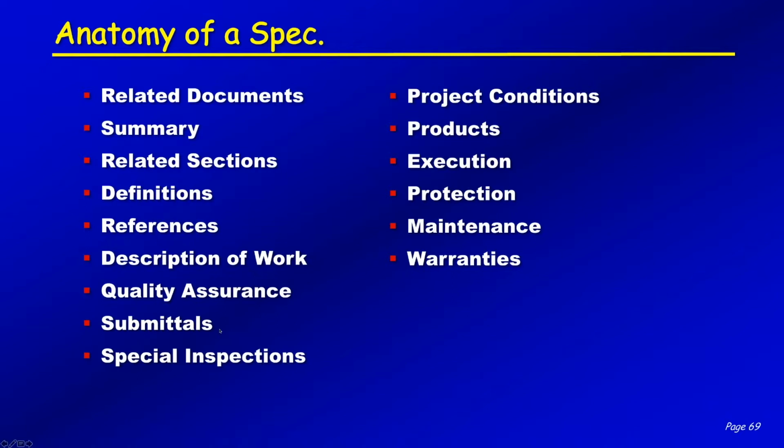I call this the anatomy of the specifications. Almost all specifications are broken down into these basic categories, which is related documents. I do a lot of teaching of subcontractors, so someone will tell me, well, I don't need to worry about bidding the concrete construction part. No, you don't. You need to look at this because you are responsible for everything in those set of specifications,